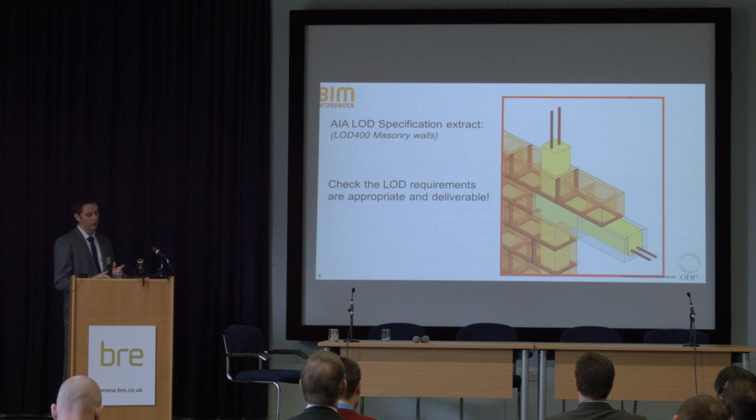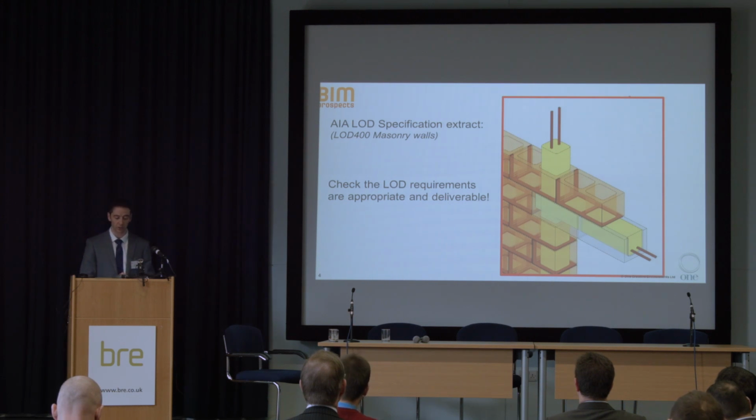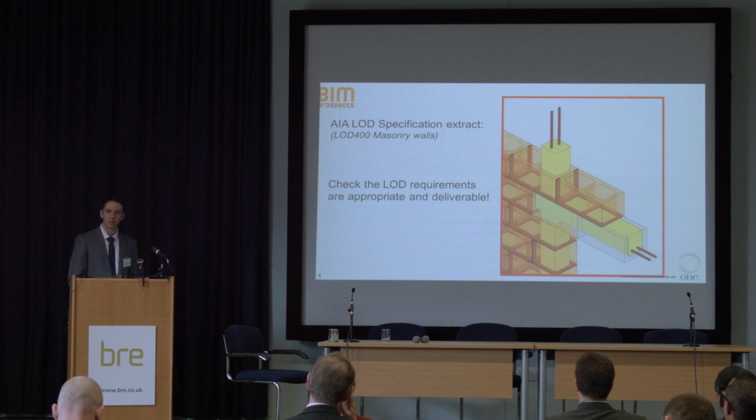Just beware that another project that we just tendered on referenced the AIA, the American Institute of Architects LOD specification. This is LOD 400 for masonry walls. And the first question we ask is, are you sure you want me to model every block? Are you sure you want me to model every mortar joint? Because I can, but it'll take one of my guys 6 months probably, and it'll cost you a fortune. And straight away, no, absolutely, we don't need that.